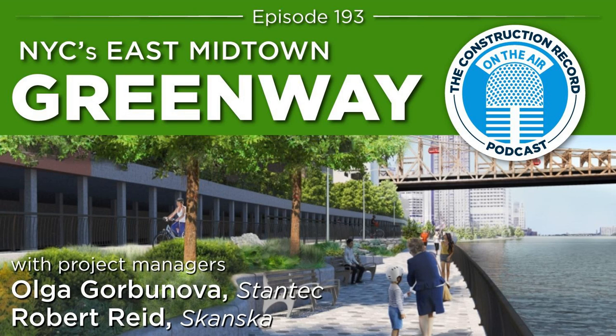The bridge was actually fabricated in Nova Scotia, shipped down to Brooklyn by truck, multiple truckloads. We reassembled it on a barge, made sure everything fit, tested everything out, and then shipped it by barge to the project on a Friday night into a Saturday morning. Had a whole bunch of visitors. Olga was out for it, and we were able to successfully install the bridge on pretty much the first attempt.